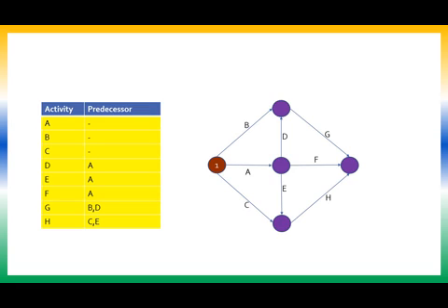Okay, so now assume, imagine lines from 1, this line and this line are removed. So if these 3 lines are removed, which will be the next start node? Obviously this will not be a start node because it has an incoming node, an incoming activity. This also cannot be a start node because it has an incoming activity. So only this activity has no incoming now. Therefore, this node will be numbered 2.